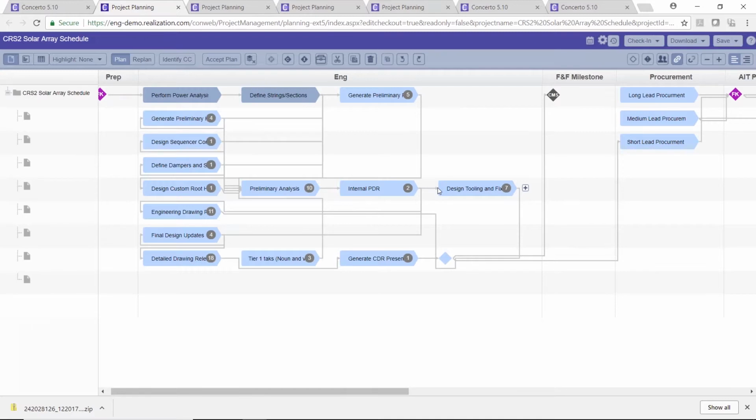Yeah. Along with these tasks, one of the things they know is that not only do they want to focus at the task level, they also want to focus engineering. If you remember the example Sanjeev gave with the castings and the fabricated mounts and clips, they suffered from the same thing. There are some items that are long lead materials. They need to get them out there because they take several months for the vendors to build. They have some medium lead and some short lead. So they used to build their schedule based on this, but it led to either rework or compromises, right?